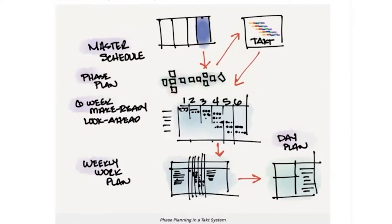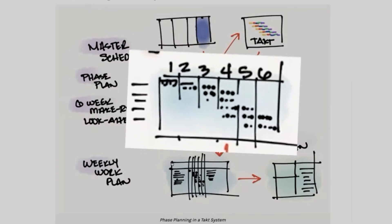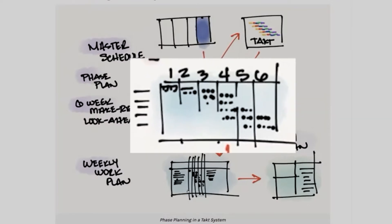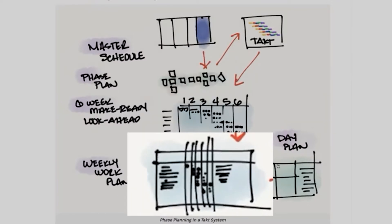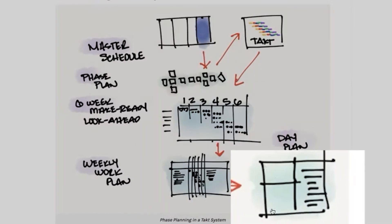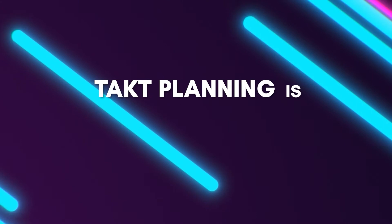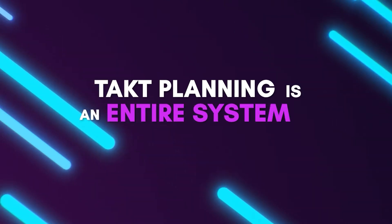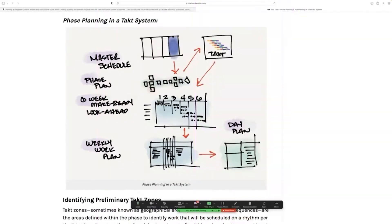From there, you're able to filter out of your tact plan, your six-week make-ready look-ahead plan, your weekly work plan, and then your day plan. And so tact planning is an entire system.